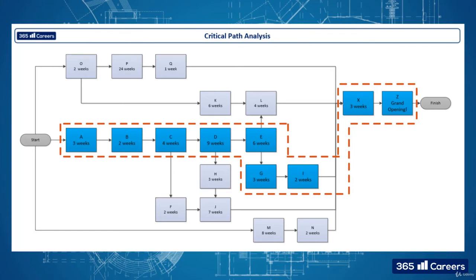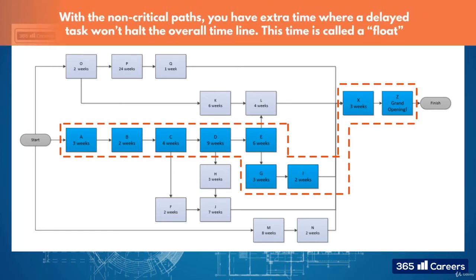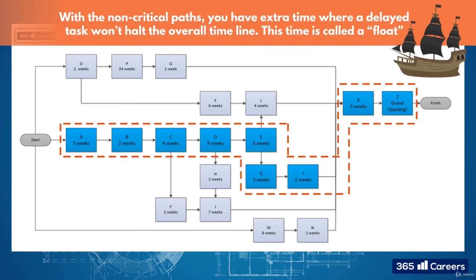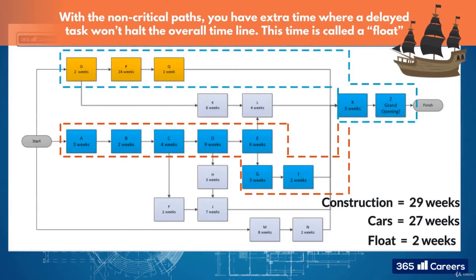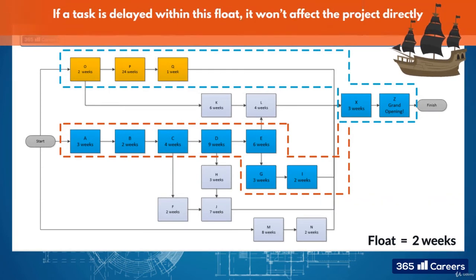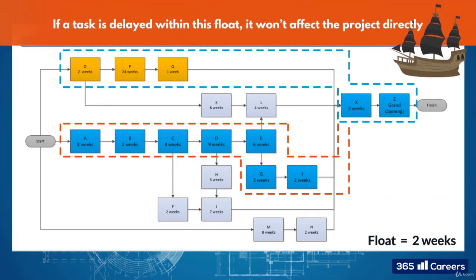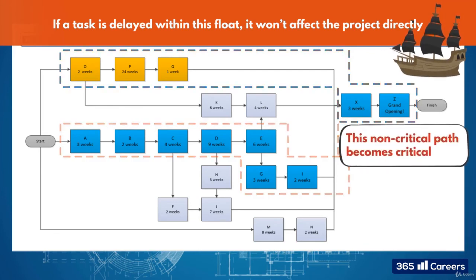With the non-critical paths, you have extra time where a delayed task won't halt the overall timeline, and this is called a float. As you can see, the car selection and production stream has a float of two weeks. Therefore, if a task is delayed within this float, it won't affect the project directly. However, if there is a delay longer than the float, then this non-critical path becomes the critical path.